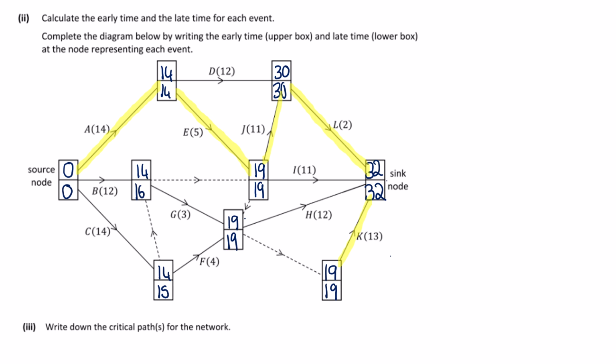Okay, so K looks a little bit stranded over there on its own, but actually there is a pathway because the two dummy activities here can help it to create a path. So there's actually two paths here.